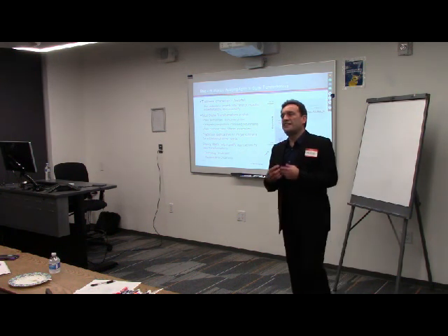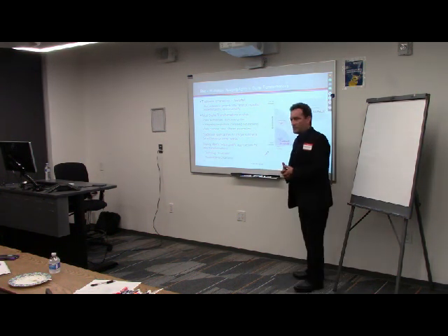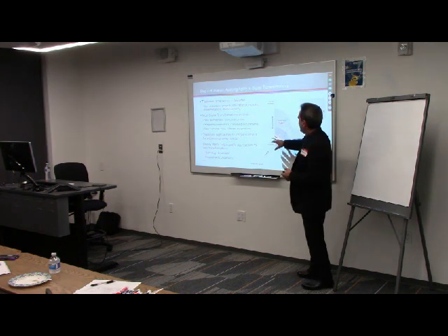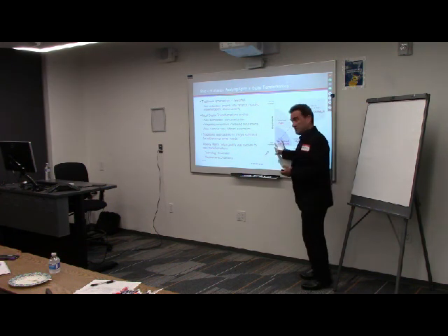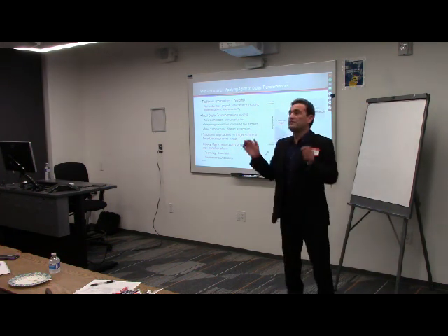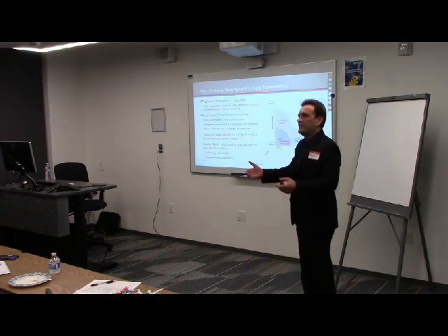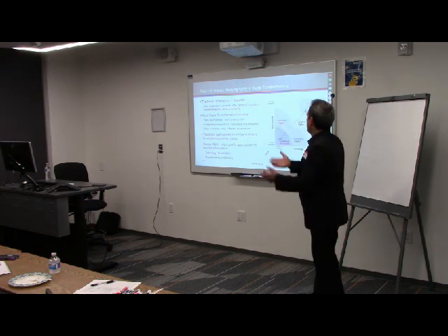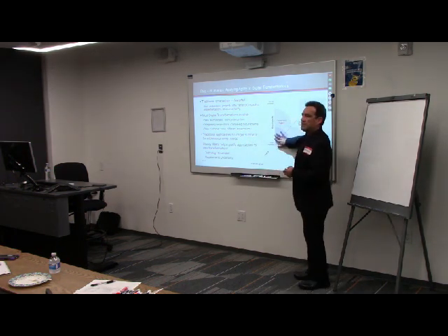The key is picking or matching the right project for the right methodology. It turns out, if you have a pretty good understanding of what you're going to deliver, if you've done it before, and you know what it takes to deliver it, actually traditional methods are great. They're the best way to do it. You could run it in a traditional way, define the Gantt chart, define the budget, and keep to the deliverables, and there's benefits to doing that for certain kinds of projects.